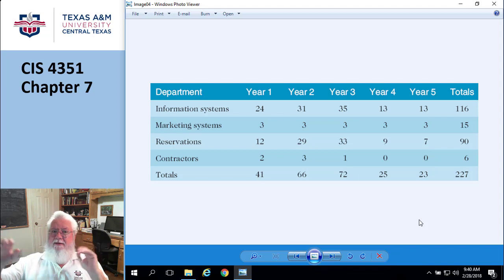That would be a good idea. And the other one is, going down this little bullet list, the goal is to have 100 of these little handheld units. And so maybe I don't buy all 100 of them all at once. Maybe I buy 20 of them in a batch and make sure everything's working until we're ready to implement, and then I'll go ahead and order all the rest of them.